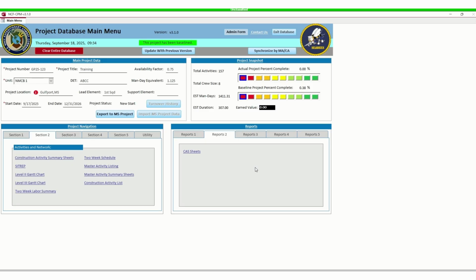Go ahead and hit OK. And you saw that it changed the dates and it went back to green. So that's very important. I'm glad that hiccup happened, but you'll be surprised how more often than not you will forget to baseline your project. Okay, so now that we're baselined, we have the 19th.